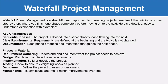The most important point in the waterfall approach is that we cannot go back — we must complete one phase before moving to the next. The key characteristics of waterfall project management are: sequential phases, meaning each phase is distinct and flows into the next; clear requirements, meaning requirements are defined at the beginning and typically not changed; and each phase produces documentation that guides the next phase.